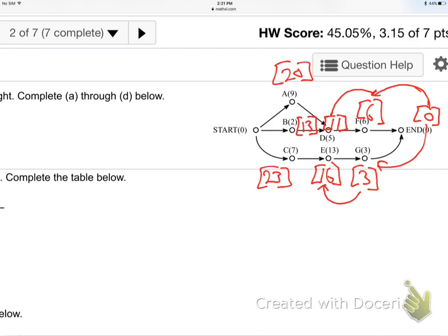So now, when I come back to the start, I actually have 3 ways to get back to the start. I have options. This is the first time in my backwards walk that I have had options, isn't it? Well, okay, so which option will you take? Highest. Whenever you have options, don't add them all up. That's a mistake a lot of people make. They add them all up. No, we don't add them all up. We take the highest. So I'm looking at 23. That could go back to start. 13. That goes back to start. Or 20. That goes back to start. Which one will I take? The 23. It's the highest one. Add 0. So that's still just 23. And there we go. We put bracketed numbers next to every job.